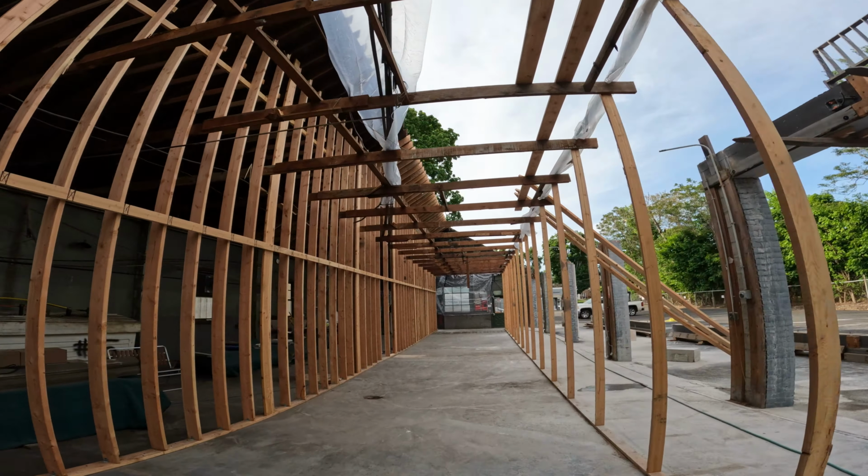I think we're gonna shave at least a couple weeks off of this job by doing it this way, maybe even more. And a big part of our cost is that lift over there is about almost $3,000 a month, maybe. The first month was like $3,500 because they charge you for the delivery and the pickup on the first month, and then each additional month is like, I forget what exactly it was, but at the end of this job, that lift is running us $12,000 about for 3 months. So I forget how it broke out, but that's what I remember the total being. So might be able to save us a couple grand on that for a month and save us some time. So I think this is the way to go.